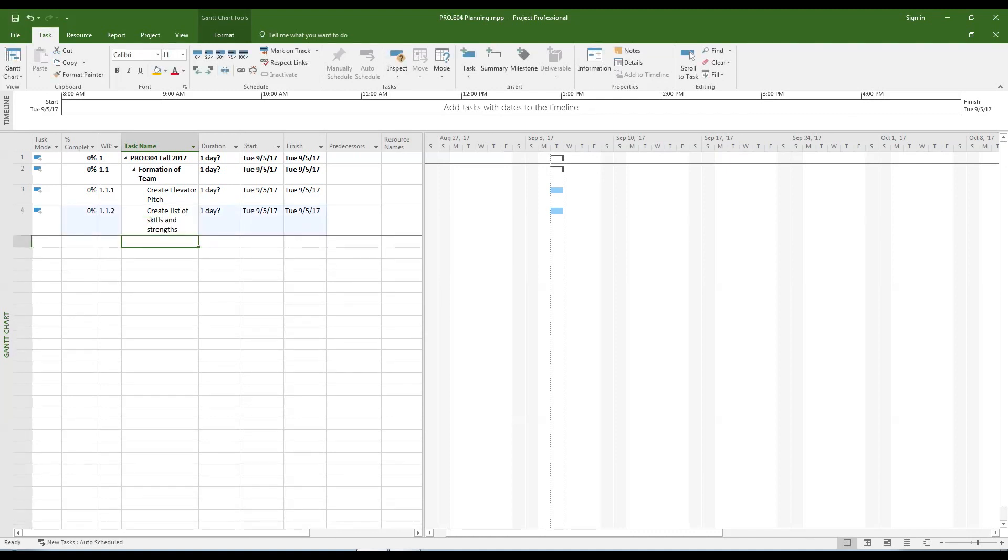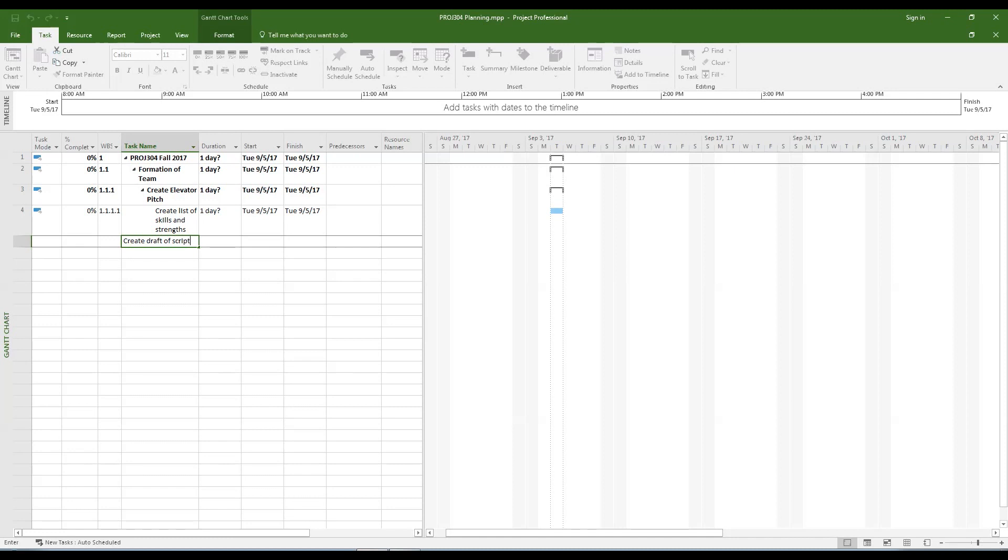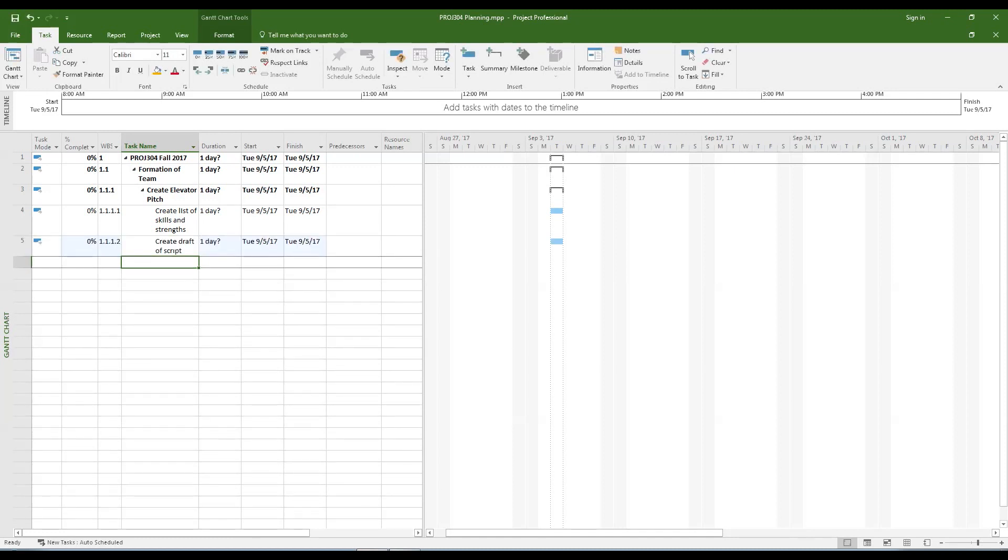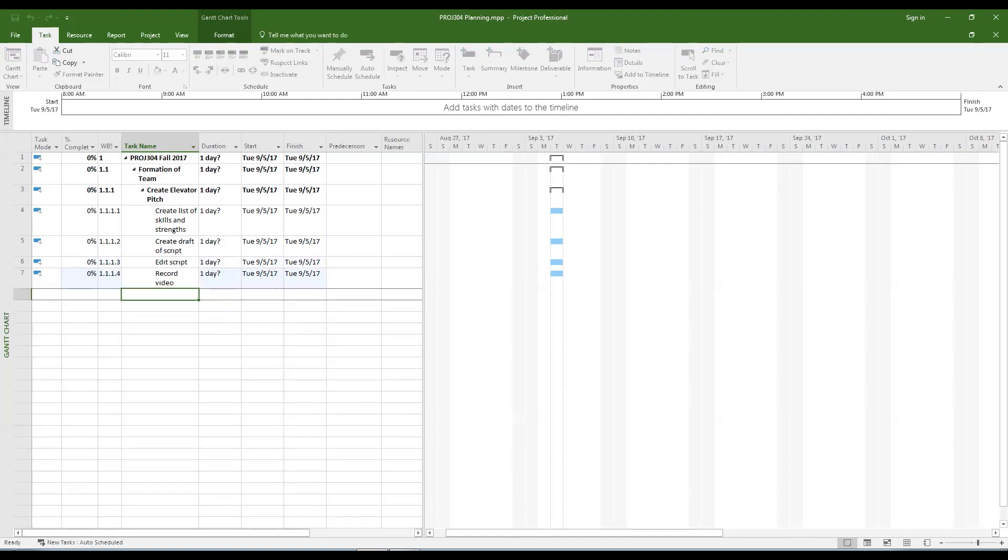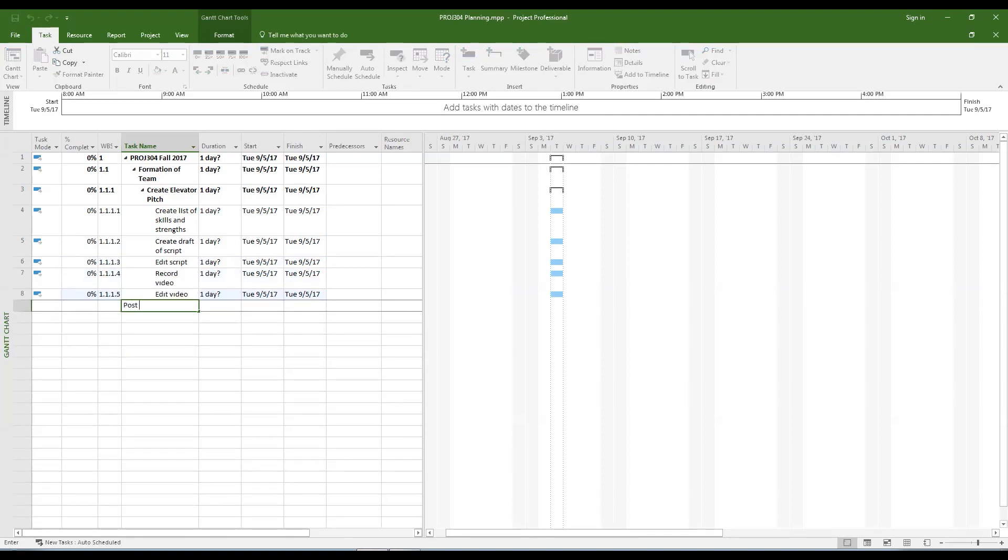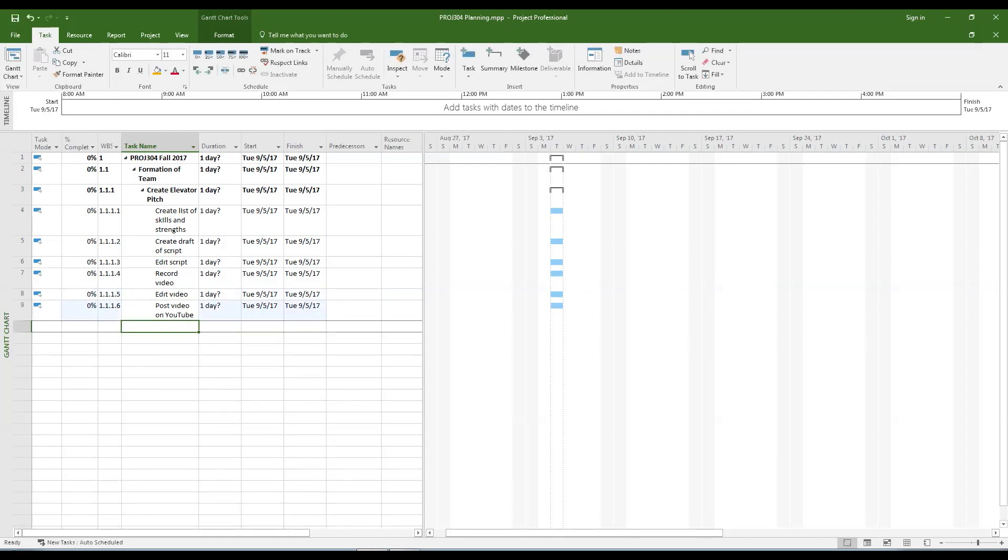While you are entering these subtasks you should also be thinking about what it is dependent on being completed before you begin working on it and what will be dependent on it to be completed. Now that we have all the subtasks created for the first second layer summary task.